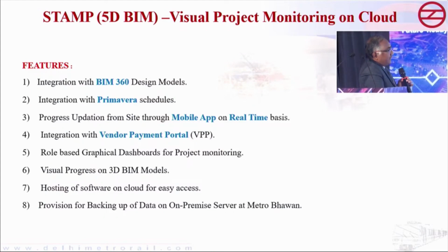Similarly, in the future contracts, like the track and all, what are the stages: whether the contract is awarded, whether the design stage is completed, or whether procurement is being done, he will be able to see. Similarly, vice versa, the system contractors can also see when they are going to get the access dates. They know the planned date initially, but now what is the estimated access date, and whether we are arranging all our designs as well as the procurement by that time. So that is important at the mid-level.